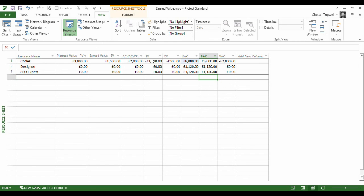Schedule variance is as was. That tells me that I should have spent £1,500 more, which means I'm behind schedule.